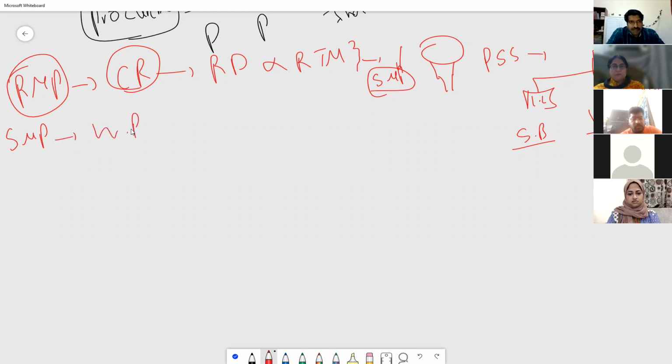With the work package we divide again into define activities. We break down the work package into the activity list, the list of all the activities. Then activity attributes: what the dependencies of those activities are, and what things those activity attributes must have. And the milestone list. A milestone is a significant point in the project, and most of the time money is related to the milestone list.